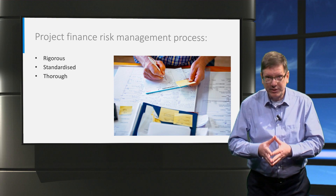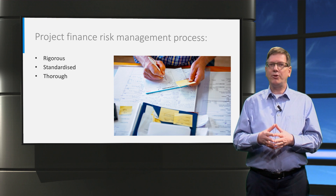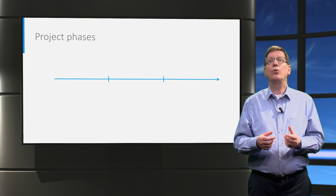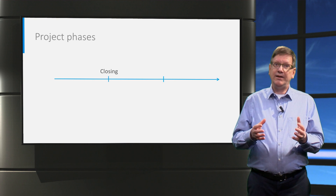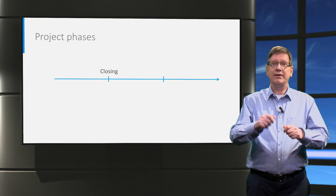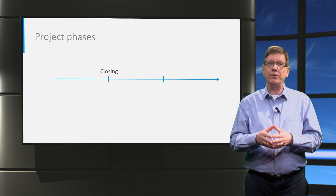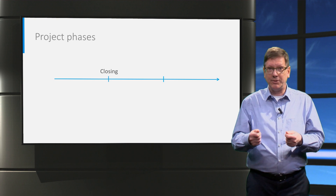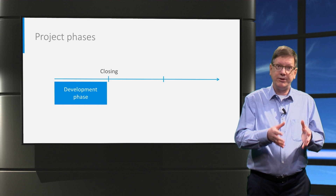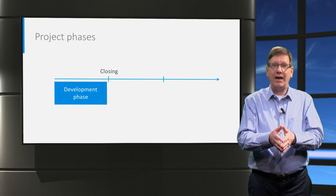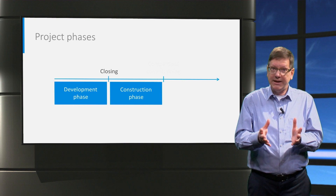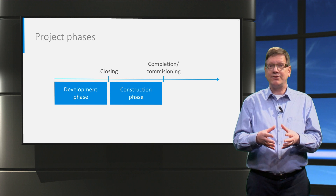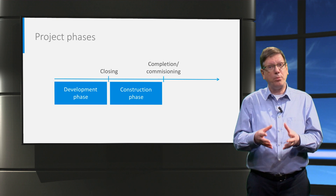So when do we do this risk management? Let's look at the project phases. The legal start of a project is usually called a closing — a session where all the project contracts are signed and the rights and responsibilities of all participants are frozen. After closing, construction can begin. Closing is where the project development phase ends and the construction phase begins. Completion, or commissioning, is when the construction phase ends and the project assets start operation — that's the operating phase.